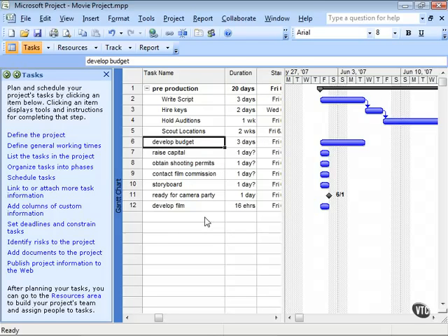So as we wrap things up here, we've created some finish to start relationships, which again is going to be the default. We've defined other types of relationships. By the way, the start to finish relationship, the one I mentioned, is not going to be used that often. It would be used in a case where something becomes available and that availability defines when the other one ends. Maybe you have just a planning phase and it's going to end when the work actually starts. That's the only time you'd use maybe a start to finish relationship, but again, to define a hard relationship between two tasks like that, it's going to be rare.